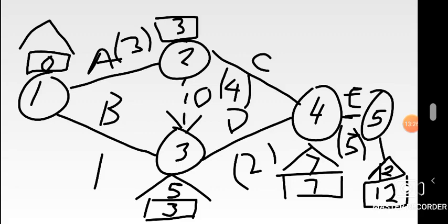This time around, we are going backwards. So that time when we're coming forward, if there are 2 routes leading to a certain node, you go for the higher one. When you're coming backwards, the criteria changes. If there are 2 routes leading to a node, we get the list of the 2 figures that we'll find. Let's start with the route from 4 to 2. On 4, we're looking at latest completion time. That's the one we'll be using.